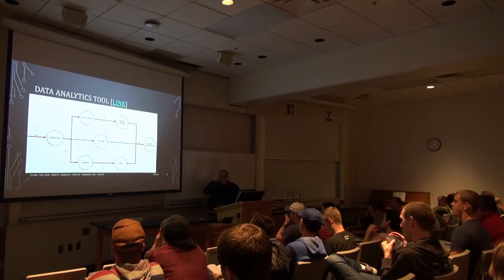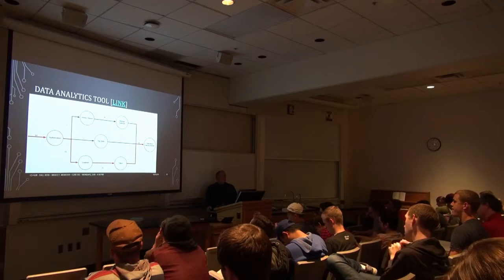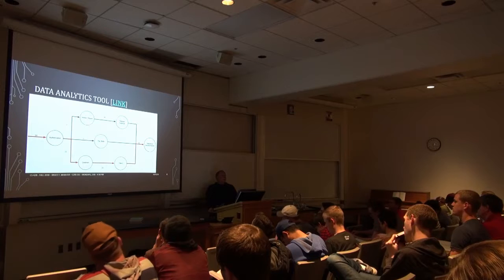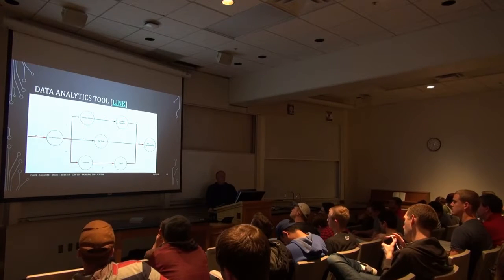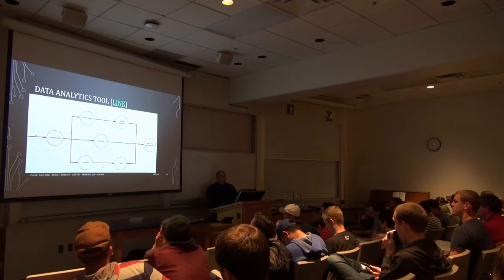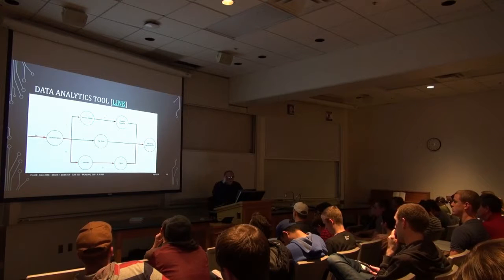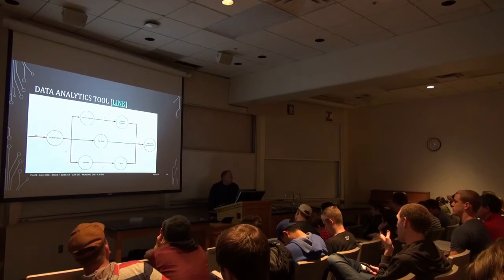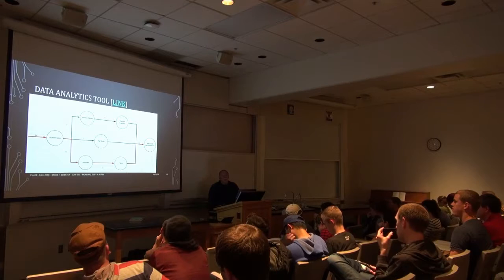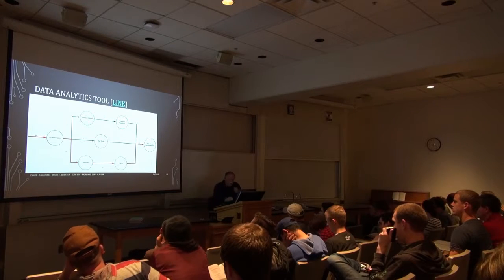That's fine. Again, any chart like this is an abstraction. It's a necessary abstraction. Unless you want 300 bubbles there, any given bubble is going to encompass a number of tasks. As long as you're comfortable with that, and you notice you've got bigger chunks here, I assume those are days. Yeah. The only risk with big chunks is that it's very easy to fall, as we're going to talk about metrics, into saying, oh yeah, we're about 80% done there. It's where you need to go in and say, do we really have 80% of the schedule done based on the breakdown of tasks within there?